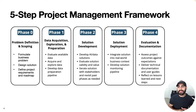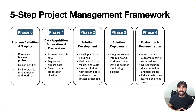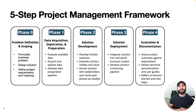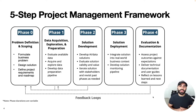Finally, phase four is the evaluation and documentation step. This involves assessing project outcomes and comparing them against expectations from the outset of the project, delivering technical documentation and user guides, and doing a retrospective: reflecting back on the project, looking at things that went well, looking for opportunities for improvement, considering future works and limitations, and starting to talk about obvious next steps. Of course, we also have feedback loops in this five-step framework.